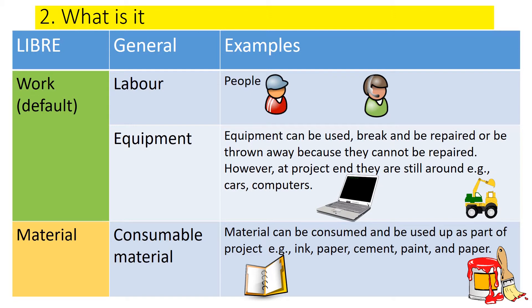The second type that also falls under the work resource is equipment. Equipment are things that can be used and can be broken during the project. If they break down, they can be repaired or even thrown away, but essentially at the end of the project they can still be around in physical format. For example, cars, computers, etc. — you don't use them up.